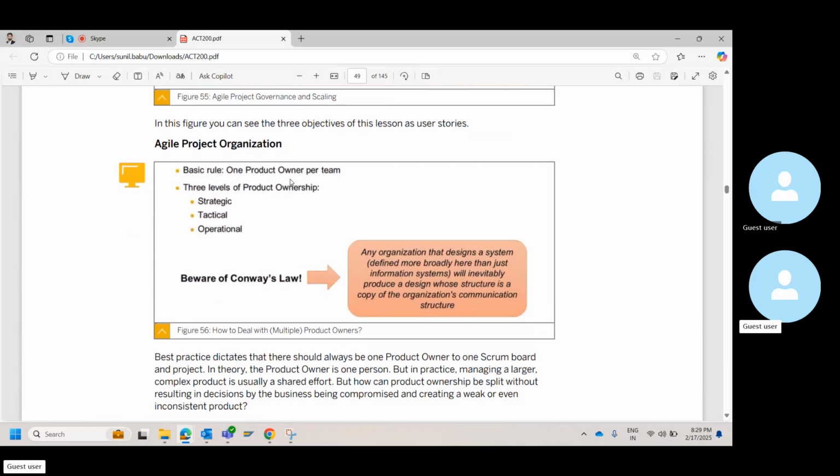They can say that under HR, under this person, you will have 4-5 people who will take care of the sub processes. That is fine. However, they cannot say all the 5 people are business process owners, when all these 5 people are going to approve only, this means that HR module is live. This cannot be the case. There has to be one business process owner, and you as a project manager should converse with that business process owner. Otherwise, there will be a lot of conflicts of interest coming up.